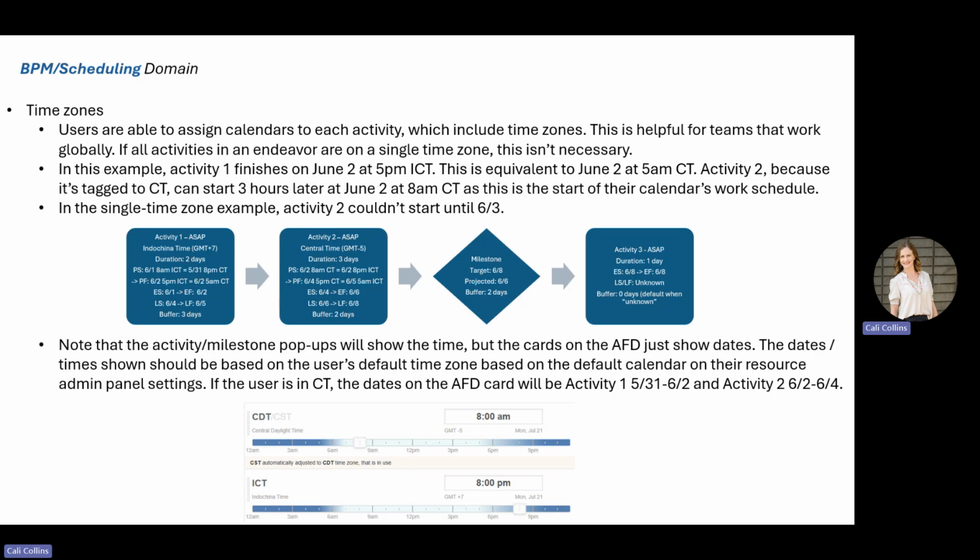that morning in Central Time. Therefore, the X activity, because it is a Central Time activity, its next start date, its day starts at 8 a.m. on the 2nd. So it's not going a full 24 hours later. Technically, this activity is only starting 3 hours later than the previous activity finishing.